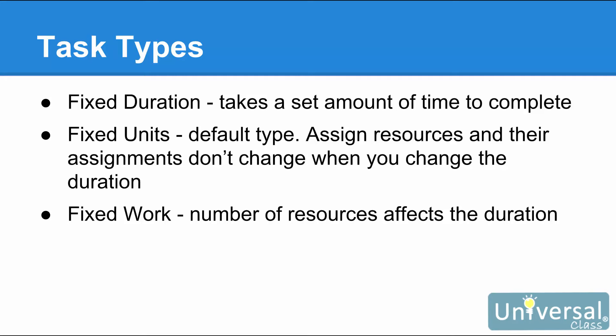Fixed Units are the default task type. When you use this type, you assign resources to a task with a certain number of units or hours of work expressed as a percentage of the working day. The resource assignments do not change even if you change the duration of the task or the work amount.